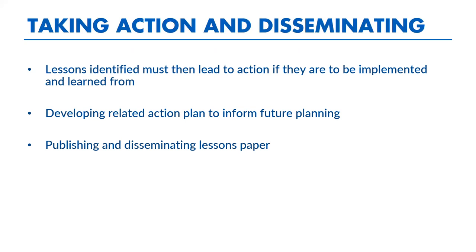And this is where you develop the action plan and include, number one, the actions that are to be taken, who is responsible for implementing these, and two, this allows you to monitor progress of implementation and, of course, the timelines for implementing some of these actions. So I think an action plan is much more important for interim project reviews as opposed to future projects. Yeah, I agree.